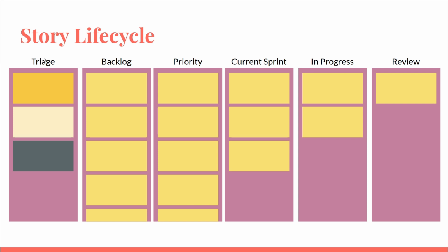We have a triage lane that we use at work where throughout the course of a week or a sprint, we will run into bugs, or we will come up with ideas or features or additional work that needs to get done. And so then we will go and create a new ticket quickly. We'll type in a title, maybe flesh out the description a little bit, maybe check some of the boxes, but we'll just get something out there and flesh it out as much as we want.